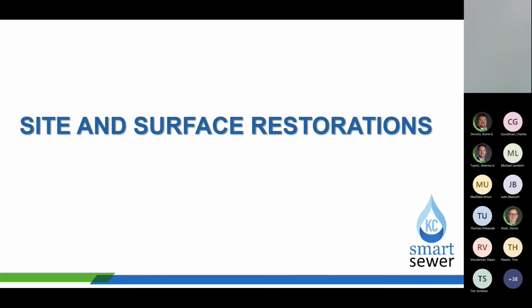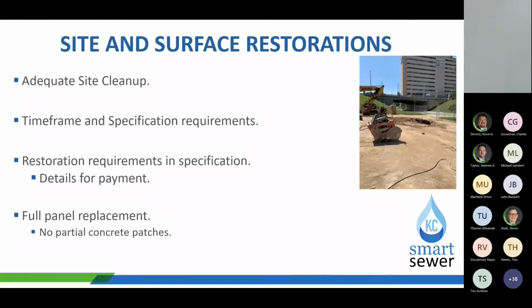With that, we'll move into site and surface restorations. So keep in mind with your projects, adequate site cleanup. We don't want the contractor leaving a bunch of spoil piles and trash, materials all scattered about. Stay on them to keep the site clean. This is a condition for processing monthly payments.